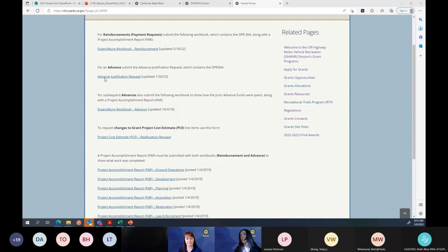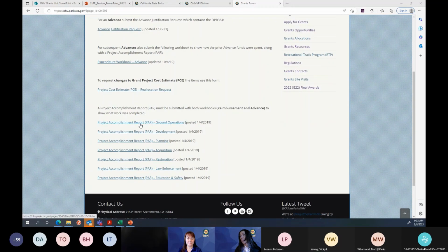The advanced justification request and the advanced expenditure workbook will be discussed in more detail in November. The project accomplishment reports are down below, and here you have one for each project type: ground operations, development, planning, acquisition, restoration, law enforcement, education, and safety. Without a project accomplishment report accompanying your workbook, you can't get paid. It's required that the two go together.